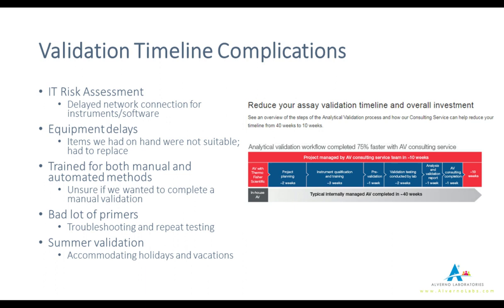We had a bad lot of primers early in our analytical validation testing. I'm very thankful we had Thermo Fisher looking over our data and a project manager assessing issues with us, because they're the experts — they were able to catch the problem in a very timely manner and knew exactly the next steps to fix it, including replacing the lots and what needed to be retested. Without their guidance, it most likely would have taken us longer to diagnose and troubleshoot the problem on our own. It set us back, but I don't think it was more than two weeks, which is considerable compared to if we had been on our own.